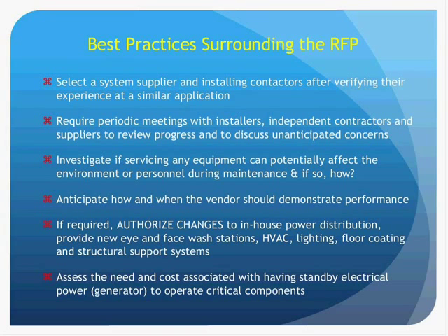They include selecting a system supplier and installing contractors after verifying their experiences at similar applications. Require periodic meetings with installers, independent contractors, to review progress and to discuss new, unanticipated concerns that may arise. One should anticipate how and when the selected supplier should demonstrate performance. I will provide a couple of options in the next section regarding the demonstration of performance.